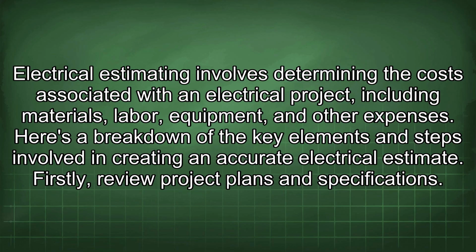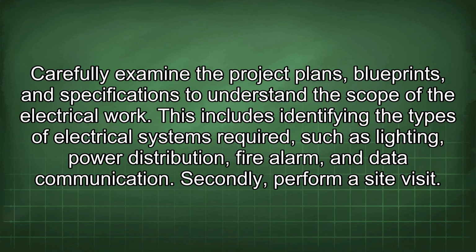Firstly, review project plans and specifications. Carefully examine the project plans, blueprints, and specifications to understand the scope of the electrical work. This includes identifying the types of electrical systems required, such as lighting, power distribution, fire alarm, and data communication.